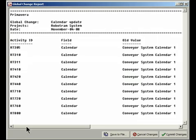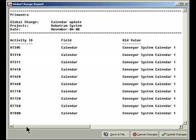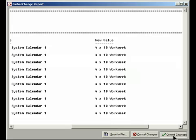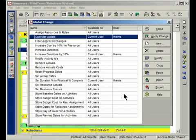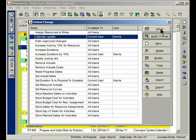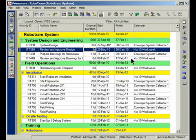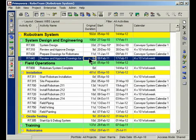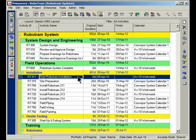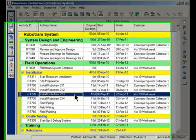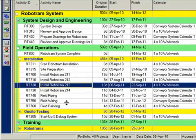Here's my change report. Again, I see old value. I'll scroll over to the right. New value is 4 by 10 workweek for some of the activities. I'm going to commit those changes. Close out of here, and have a look at my project plan. You'll see that any activity that has less than 10 days in the duration calendar, now has the new 4 by 10 workweek. Of course, activities that have 10 days could be included as well.